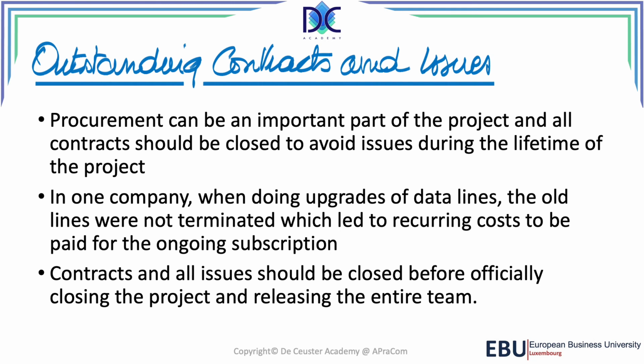So basically they upgraded to 2 megabit, and the old data line of 512 kilobit was still there, and the company kept on receiving invoices. Where do you have to put that invoice? You don't know, and it's working on the profitability of your project. Now, you have to close all these things. You have to see that there are no leftovers, and at that moment you can release the team.